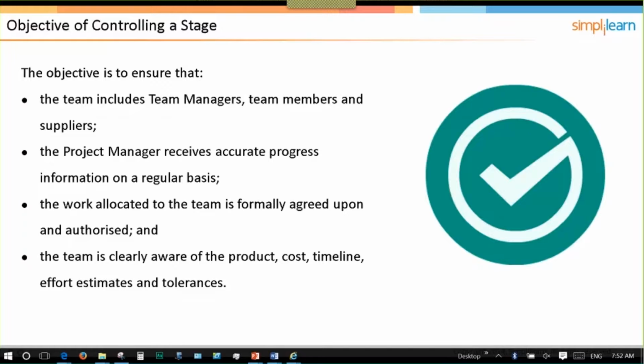Go ahead. So, what I meant was, we don't have the product description really signed off, for various reasons. It could be that they are not clear on what exactly they want. There might be changes that will come their way in terms of the functionality. There could be priority changes and they want C to be completed much before A is completed in a sequence of A, B, C. So that is where Agile is helping us in terms of quickly adjusting to the schedule and going back to the MVP, what we call in Agile, the minimum viable product that they would want, and keep on adding the additional features as and when they keep asking us.